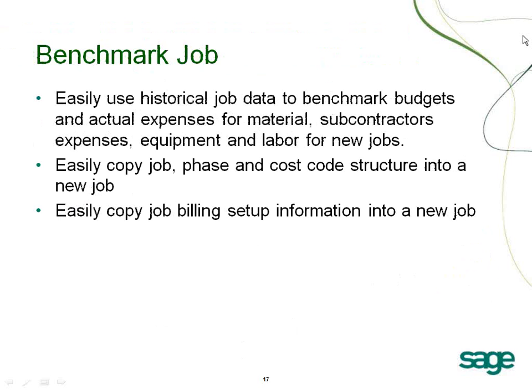We can benchmark our jobs. We can then easily use historical job data to benchmark budgets and actual expenses for materials, subcontractors, equipment, and labor for new jobs. We can easily copy our job information, phase, and cost code structure into a new job. We can easily copy job billing setup information into a job. It streamlines the entire process of setting up our jobs, saves a lot of time.